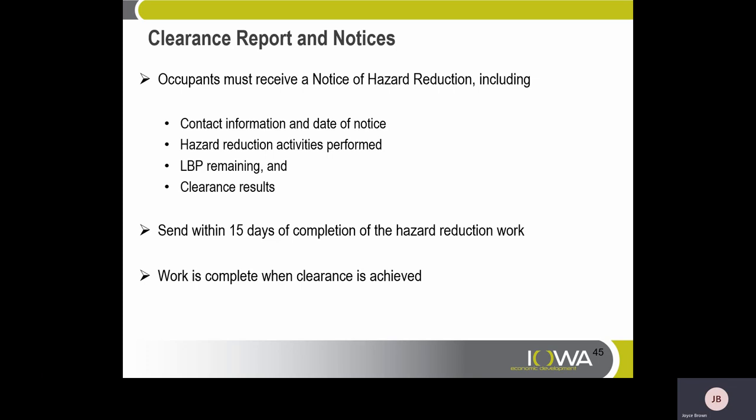Clearance report and notices. Occupants must receive a notice of hazard reduction including contact information and date of notice, hazard reduction activities performed, lead-based paint remaining, and clearance results. The report must be sent within 15 days of completion of the hazard reduction work, and work is complete when clearance is achieved.